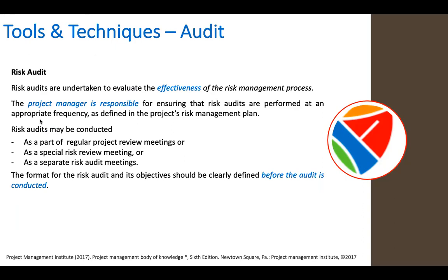The project manager is responsible for ensuring that risk audits are performed at an appropriate frequency as defined in the project risk management plan. A risk audit may be conducted as a part of a regular project review meeting, or as a special risk review meeting, or as a separate risk audit meeting.